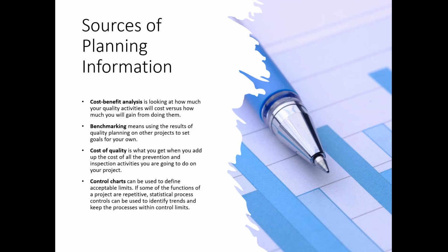The first is cost-benefit analysis, which is looking at how much your quality activities will cost versus how much you will gain from doing them. The costs are easy to measure. The effort and resources it takes to do them are just like any other task on your schedule. Since quality activities don't actually produce a product, it is sometimes harder for people to measure the benefit. The main benefits are less reworking, higher productivity and efficiency, and more satisfaction for both the team and the customer.